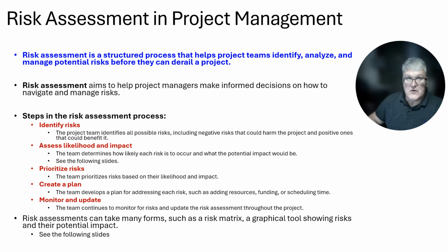I'll talk about failure mode effect analysis, pretty much the same thing as a risk assessment. In engineering, an FMEA is used quite a bit, and that is to problem solve problems before they start, so you know how to address them. So you identify the risks, you assess the likelihood and their impact, you prioritize the risks, find out which ones are going to be major factors and which will be minimal factors and may just be slight hindrances.